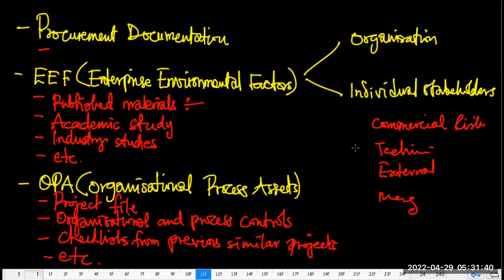And it could be that under each of them, there are questions that will help you identify risks. Maybe under, say, technical, you'll be asked, have you identified this risk? Yes, no. Have you identified these other risks under technical? Yes, no. So it's up to you to think whether this risk is actually related to the particular project you're doing currently.